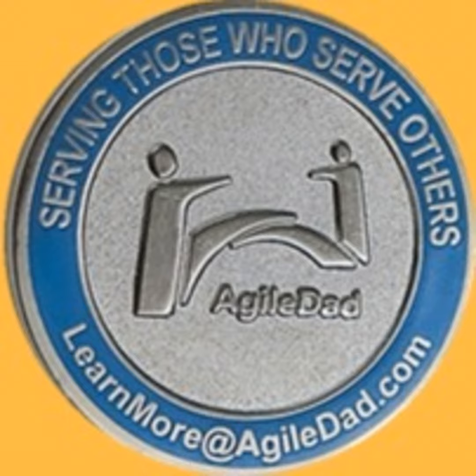I don't let people settle for person days or person hours just because each person's going to operate differently. They have different skill sets, different tools they're going to use, different levels of experience. So what might be a 1 person day for one person might be a 1.5 for another person or 0.86 for another person. It just doesn't make sense when you pull time into the equation.